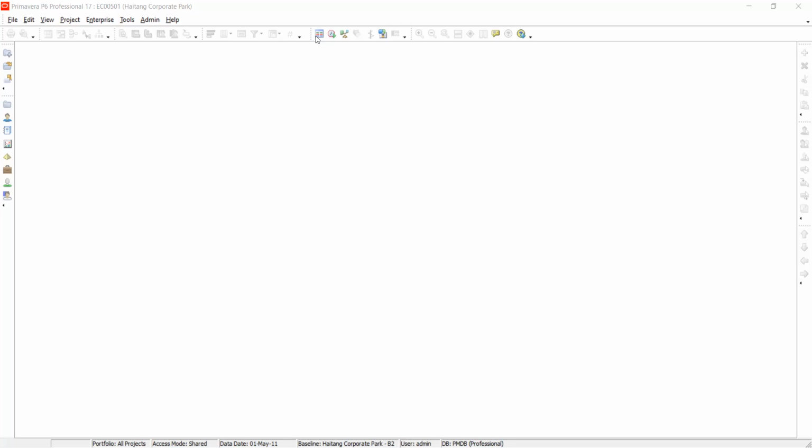In the other activity, they need to be there 100%. But now there's also another activity running concurrently. So what the software does, it can split the other activity, or it may say let them first finish this activity, then they can go on to the other activity. That means if you had scheduled the activities to take place in 1 week, one of them is going to be pushed to the next week so that the resources can be efficiently utilized, not exhausted.